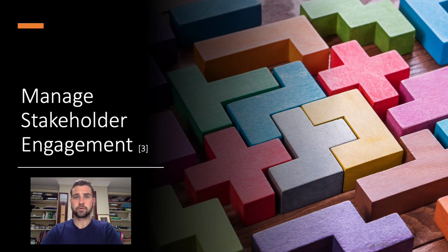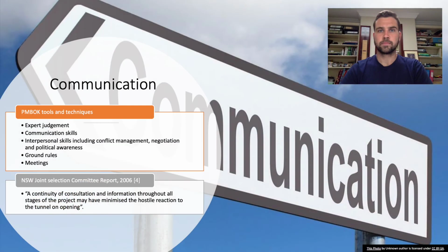The managed stakeholder engagement phase ensures that interactions are kept transparent and ongoing with all major stakeholders. Any updates to the stakeholder management plan need to be verified with a change request being completed. Throughout the Cross-City Tunnel project, multiple changes occurred, greatly impacting the project costs and creating conflict between the government, the RTA, and Cross City Motorways. Tools and techniques provided in PMBOK for this stage promote using appropriate communication and team skills.